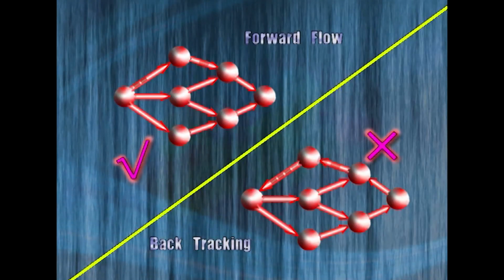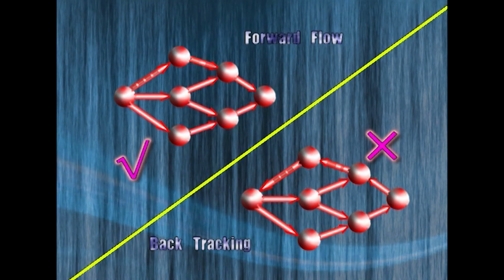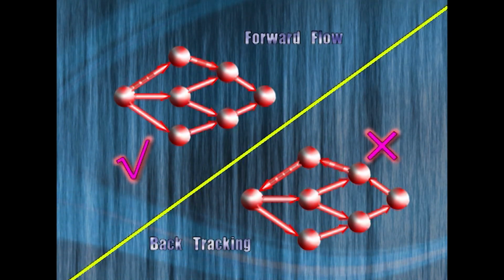That brings us to a very important point. What you say is very important in the sense that there is a unidirectional flow through the network. There is in fact no backtracking ever. You will never find a network where activities are going back in a direction opposite to all other activities, because that can create a loop. And you have never got a loop in a network. A network proceeds in a unidirectional manner.